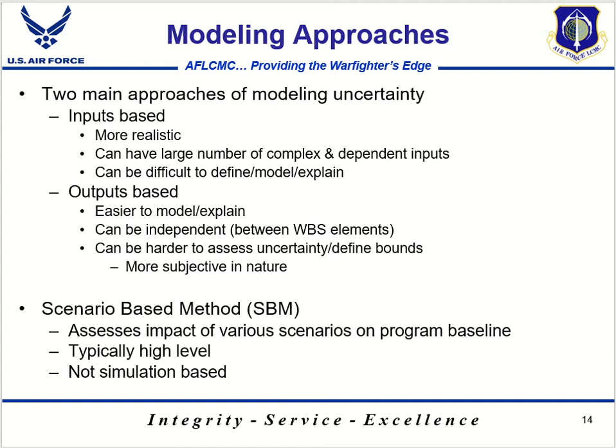So in terms of modeling approaches, there's really two main approaches to consider, inputs-based and outputs-based. An inputs-based simulation is where you assess and assign uncertainty at the input level within the estimate. So for example, you may put some bounds around a learning curve percentage or a complexity factor or something like that. Inputs is more detailed and it can be more realistic, but it can also be more difficult to model.